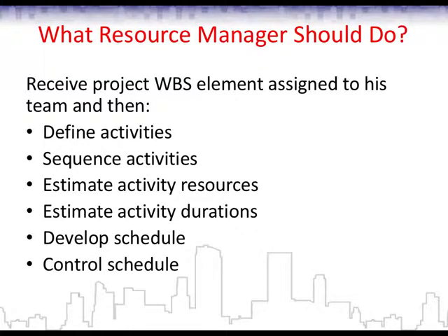another problem here is that if a resource manager changes something in his sub-project, it automatically reflects in the project schedule, which is not good, because in this case, the project manager is not actually controlling the schedule of his own project. There's also a deliverables mechanism in Project Server, but it's not very convenient, and from my perspective, I never managed to use it successfully. Maybe I'm wrong, and maybe in chat you can write me your experience with that. But I didn't manage to implement this model in Project Server out of the box.